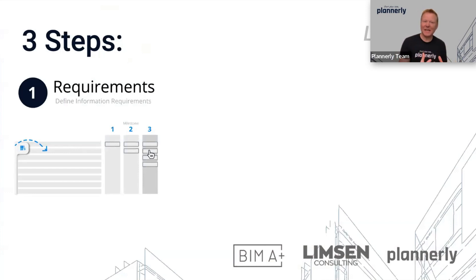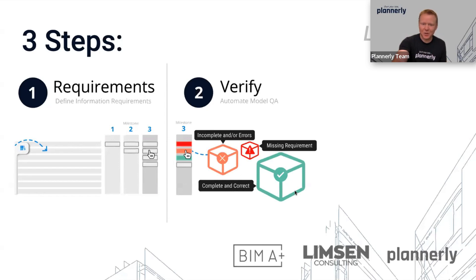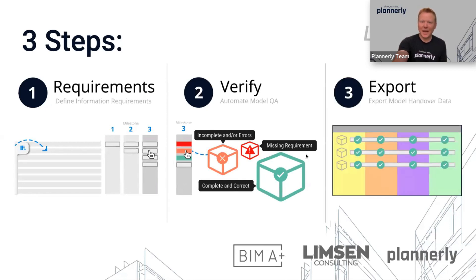What we have today is how those three steps incorporate templates for COBE requirements that can be packaged into a set of information requirements for your project for each milestone. Then we have a process for quality assurance that automates the model check against those requirements and tells you if things are incomplete or if there are missing requirements. And we also have an export integrated into this workflow that can enable you to automate this process a lot more than the manual work of creating lots of spreadsheets.